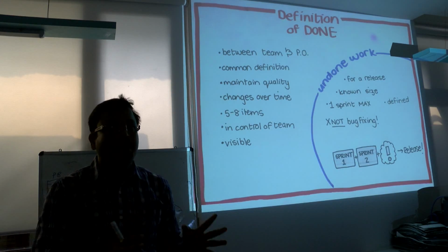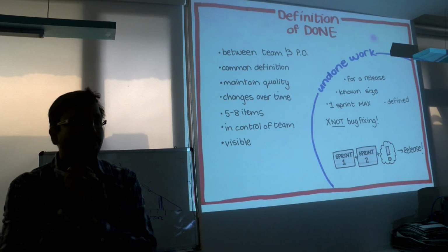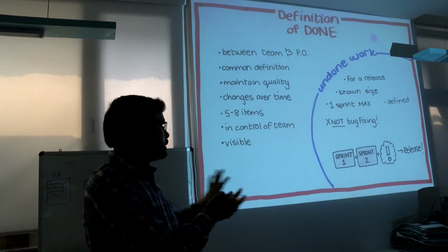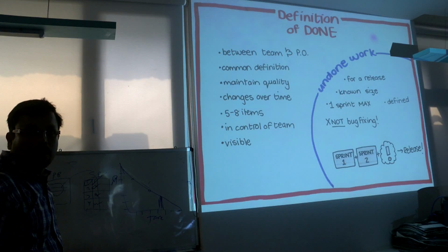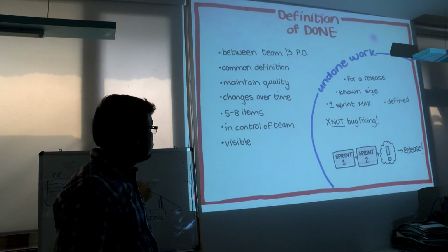If they are not accepting, it means your particular task of that sprint failed, and that particular task comes back into the product backlog. Remember, that task goes back into the product backlog, not the sprint backlog, which means you failed on that.